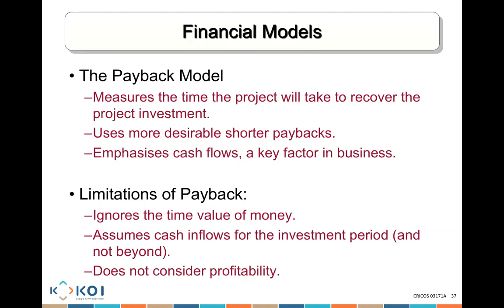It costs me $1 million, and every year I'm going to generate $250,000 in saved costs. How many years do I need to get payback for the project to be paid after I've invested $1 million? What do you think? I think 4 years. Absolutely, 4 years. $250,000 the first year, $250,000 the second year, $250,000 the third year, $250,000 the fourth year, and guess what? I got the $1 million back. And that's a payback model.